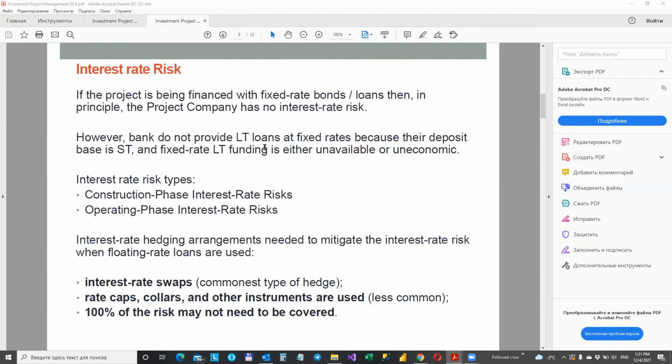So probably you will not want to capitalize, but to pay the interest while borrowing probably on better terms in another loan. Thus, interest during construction, called IDC, becomes part of the project's capital budget. And if the interest rate for the IDC is not fixed, it is eventually higher than in the original project budget. This is a construction cost overrun.